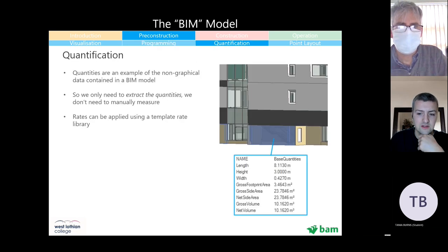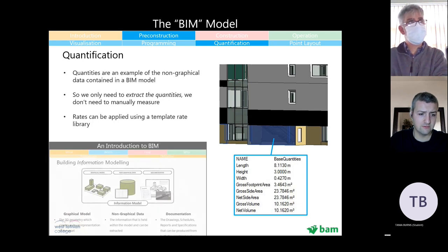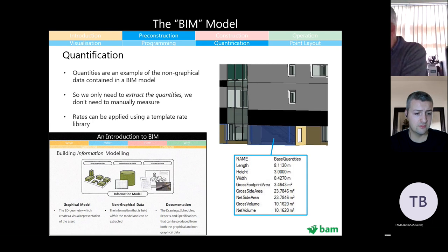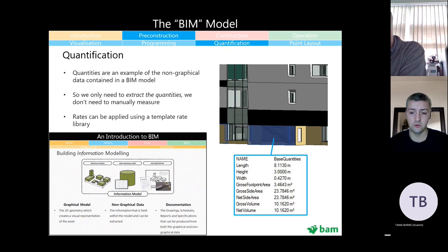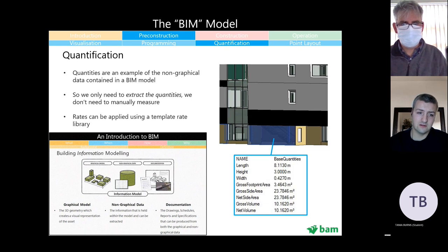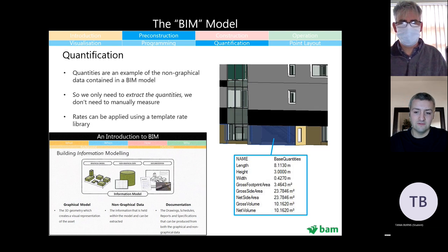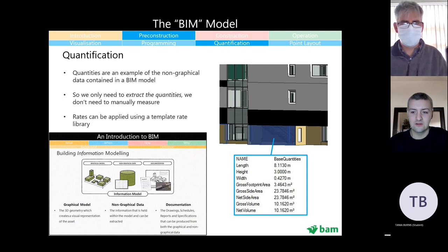Quantification is another major benefit — this is what's referred to as 5D BIM. When you model a wall and pull it along, all the quantities — length, height, and so on — automatically update. That means all we need to do is extract those quantities to Excel or whatever system is used. You shouldn't need to manually measure anything, especially when the model is trustworthy and drawings are produced from it. We should just be extracting quantities and saving everyone time.